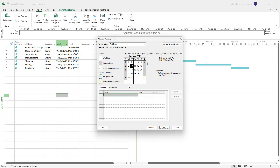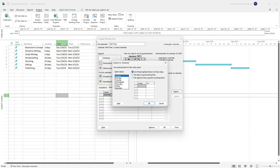The Part Time calendar has been created. If I go to the Work Weeks tab, I can select from Monday to Friday and set the days to specific times. I'm going to set this to 10am through 1pm, then delete the second record and press OK.